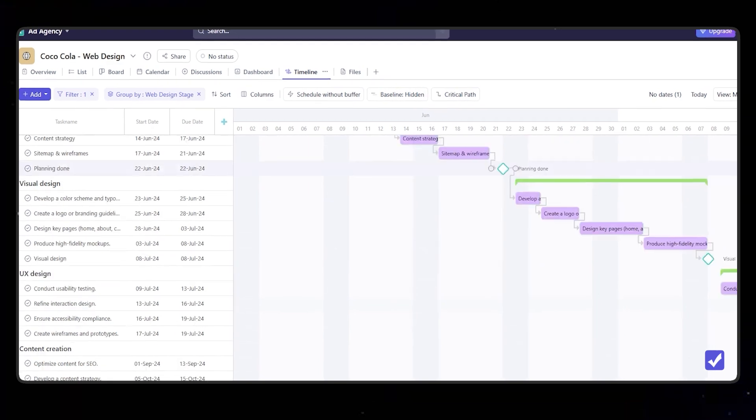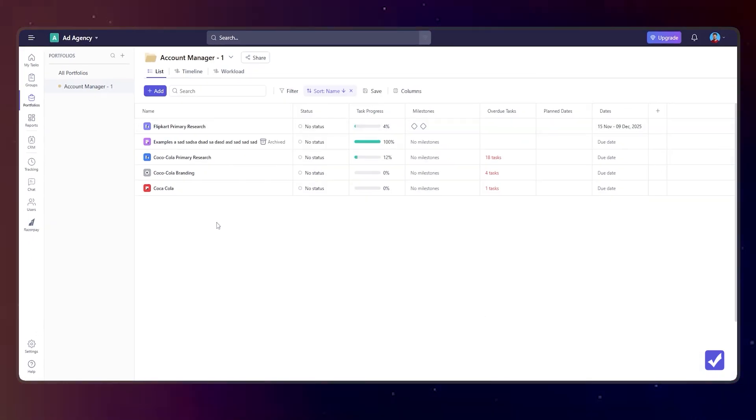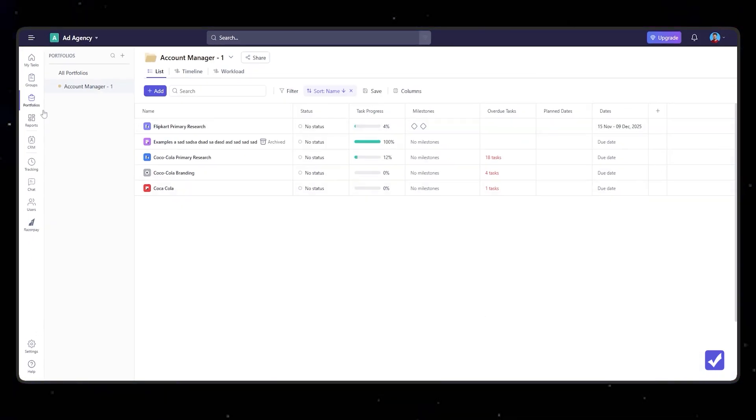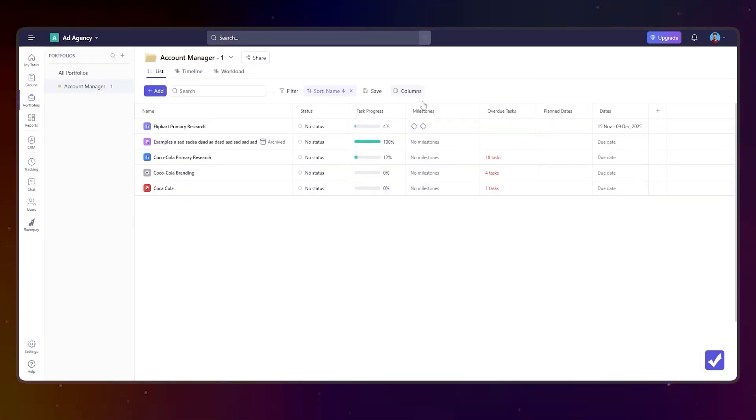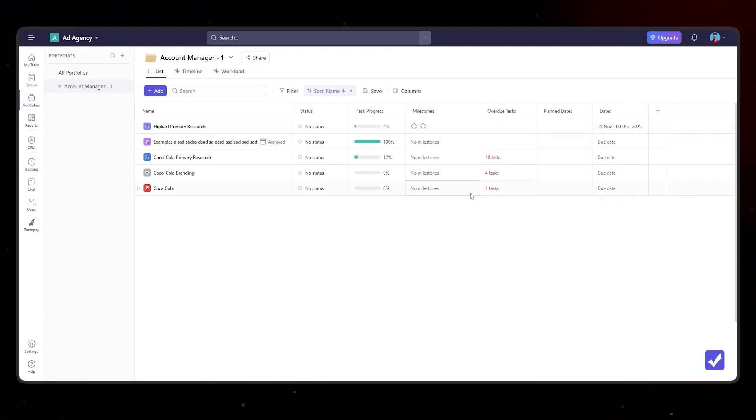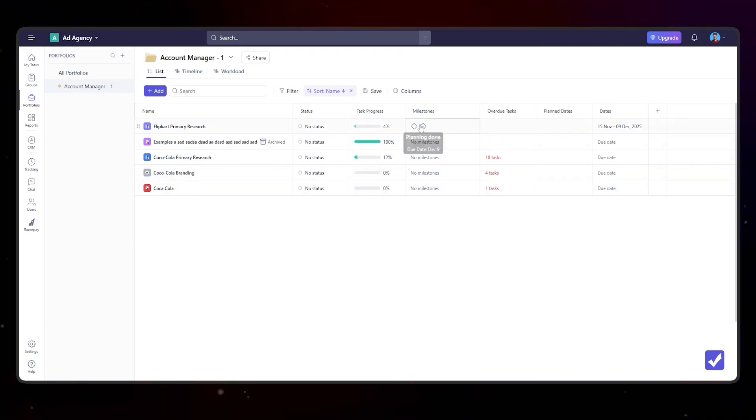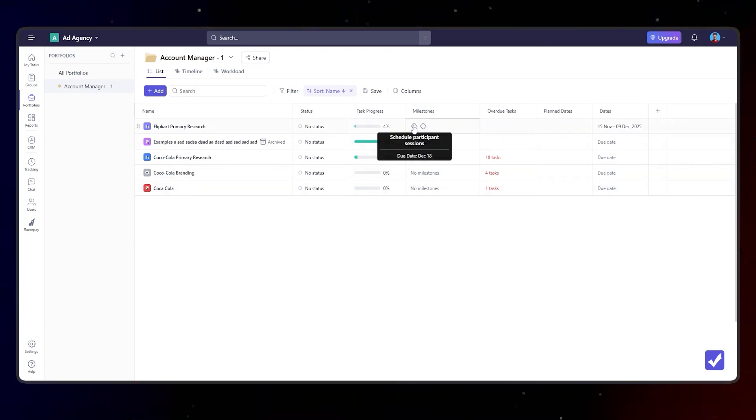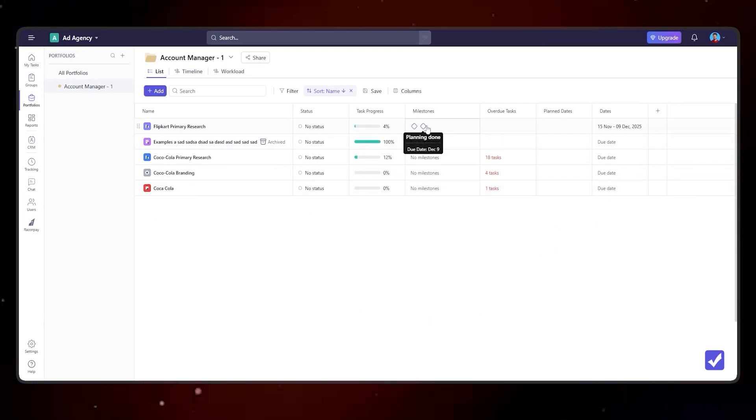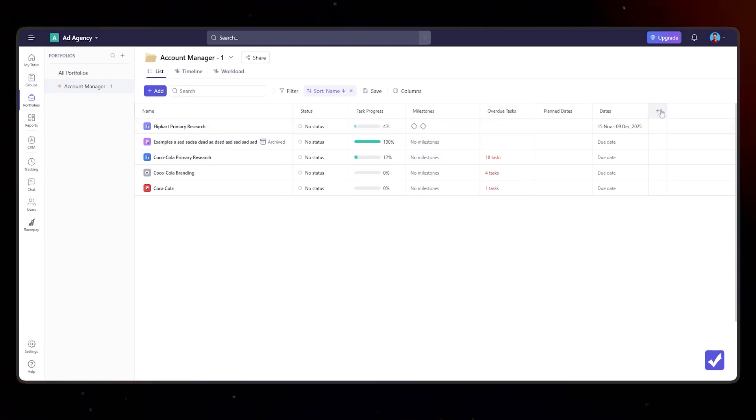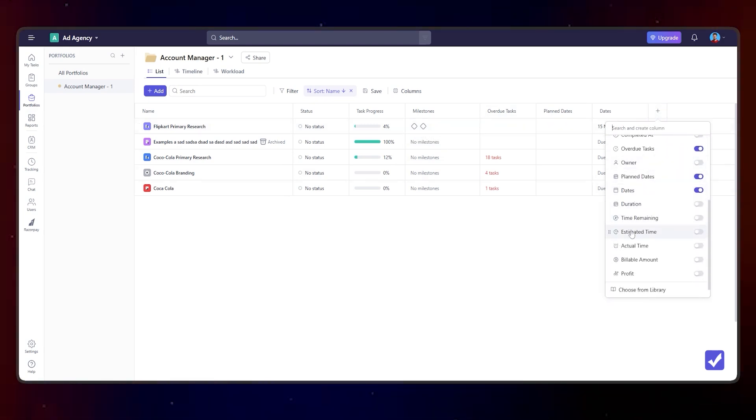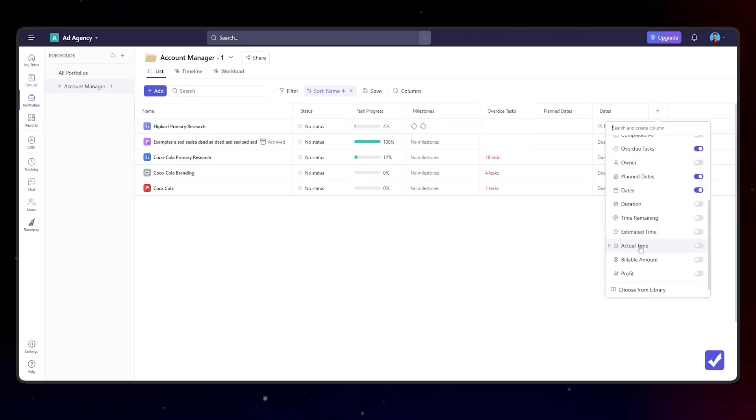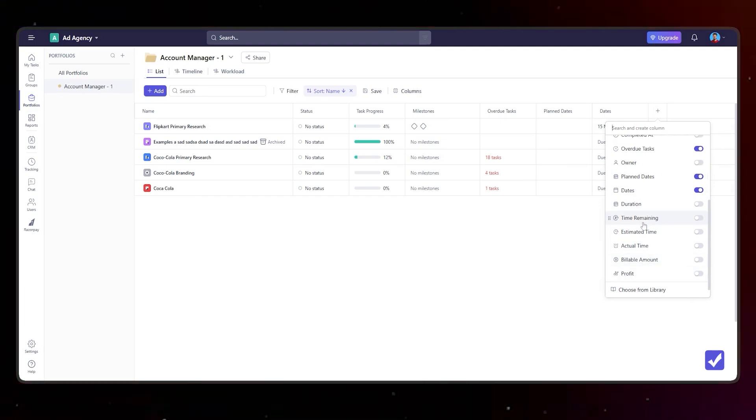Of course we had the portfolio view earlier, now it is revamped with more options and more columns. You can see here we have milestones with tasks that are completed and tasks that are still pending. So it gives you an overview, and of course you have an ability to add more columns like actual time, billable amount, profit, and so forth.